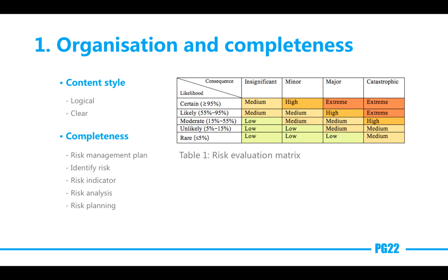After the risks are identified, the risk evaluation matrix is used in this section to assess each risk. With the combination of consequence level and likelihood, the risk level can be evaluated quickly. Finally, 3 strategies are used to control the risks. Avoidance strategies, minimization strategies, and contingency plans are clearly listed after each risk.